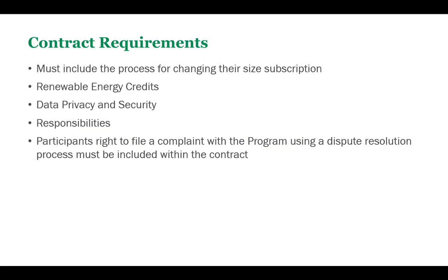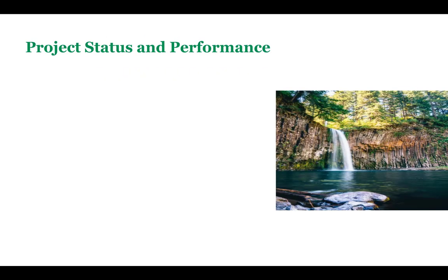The participant's right to file a complaint using a dispute resolution process must be included in the contract. The project manager's dispute resolution process must be clearly described, as well as any mandatory arbitration processes.